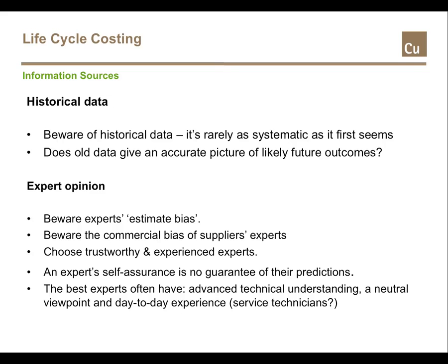External experts can have a commercial bias. Suppliers might be overly optimistic to influence their sales process. Always try to find out how key parameters were determined and on which assumptions they rest. Some experts will produce parameter estimates with the pretended infallibility of a papal decree, while others might be circumstantially excusing themselves for their inaccuracy before giving the requested numbers. Do not assume that the self-assurance of an expert is a quality meter for the information he or she provides.